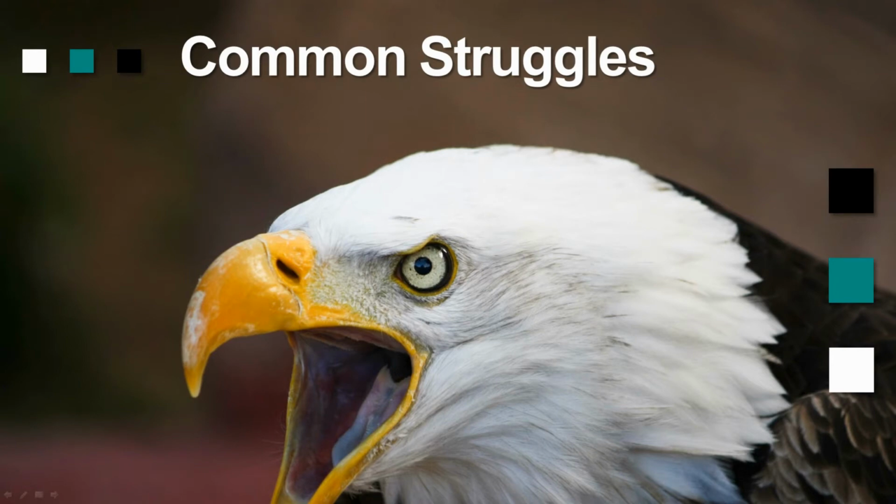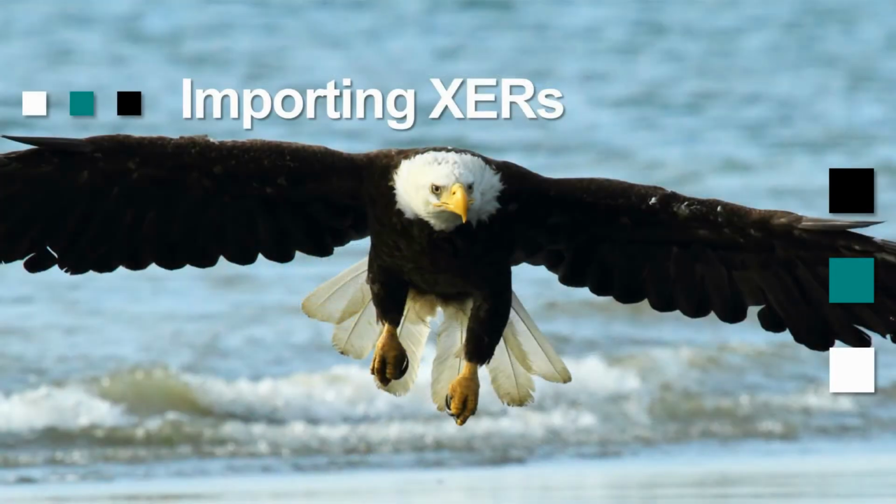When you're dealing with program management, you may have to deal with engineering and construction P6 schedules, but you may not necessarily want those people working directly in your P6 database. So you need to find another way to get those schedules into your environment. Most commonly, this involves importing XERs.